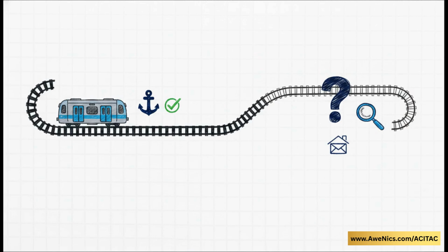There's actually a fascinating real-world example of this from our source material, the Pune Metro project. So the phases in Kochi and Swadkru Shivajinagar had already started execution. Contractors were literally on-site working, so those specific phases were baselined and totally frozen.